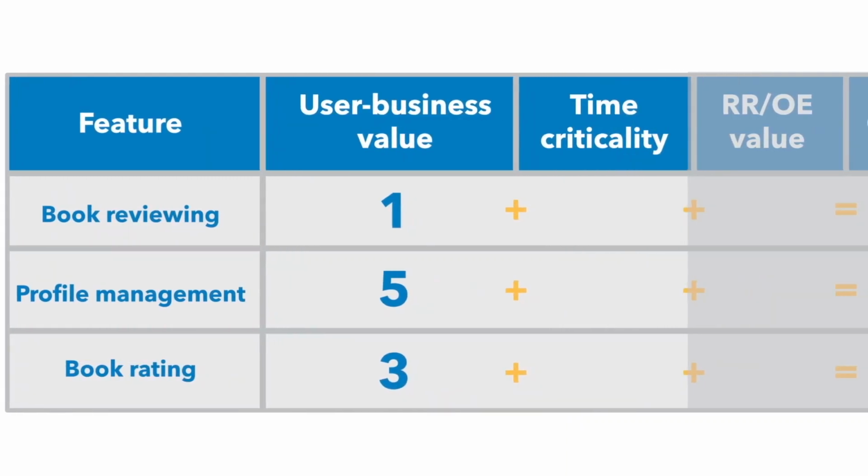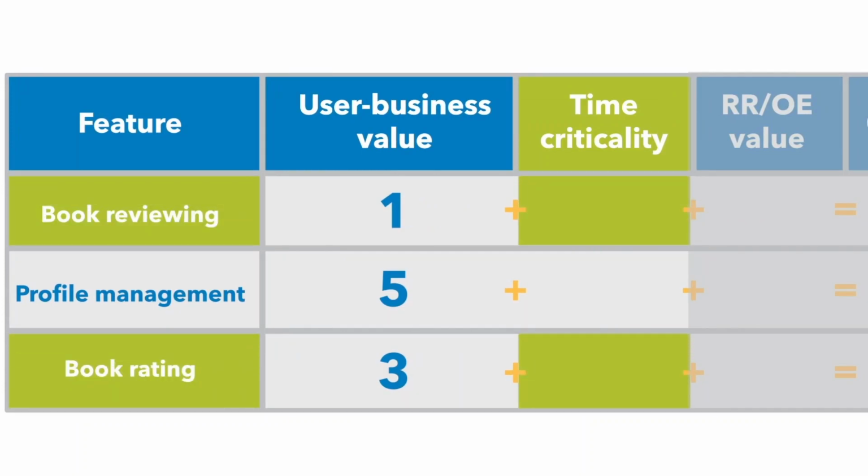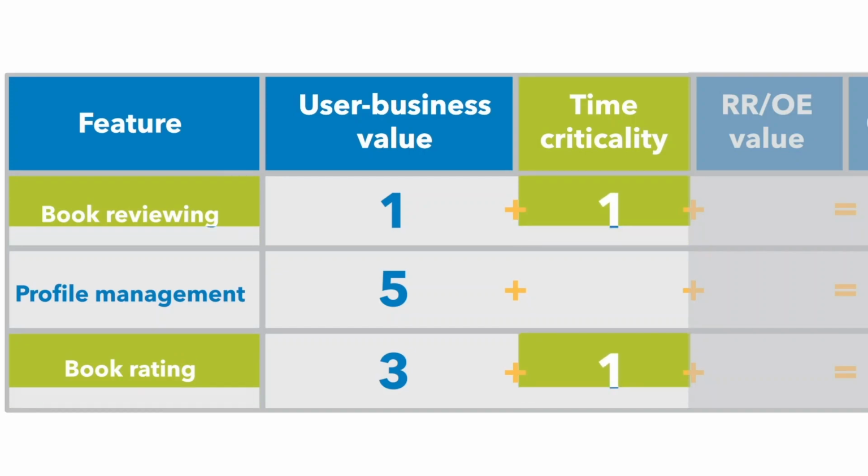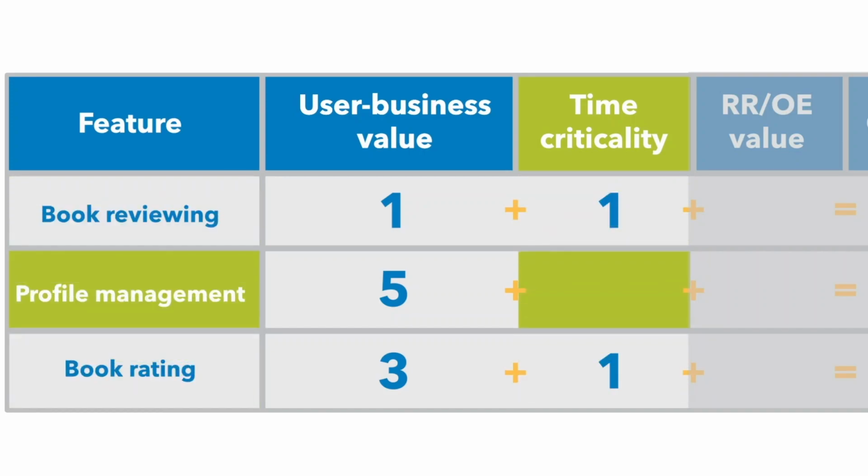The next column is time criticality. Neither the book reviewing nor the book rating feature is time critical, so we give both a 1. Because profile management doesn't exist yet, there's already a negative impact on customer satisfaction, so we give this feature a 5.